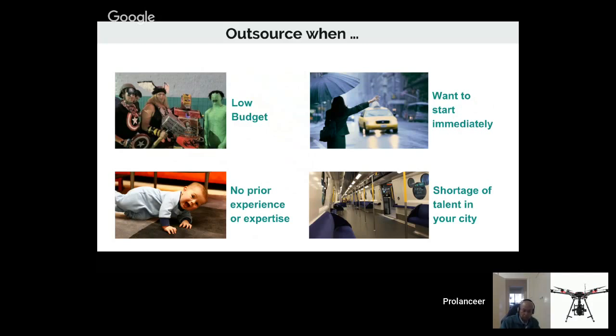And if you want to start immediately, within a week or within a month, then you should try to find an outsourcing team, because finding or setting up an in-house team of minimum 4 to 5 people is going to take you at least 2 to 3 months.